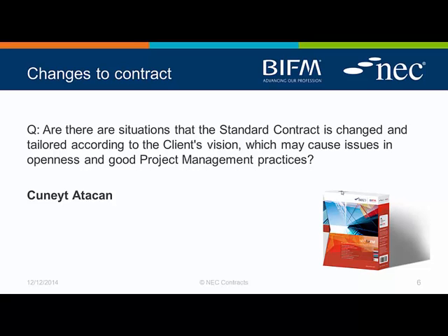My own personal view, when I'm trying to put a contract out and I'm under pressure from within the buying team, somebody saying, "Oh, I need this in the terms and conditions." In a lot of cases, they don't actually need to go in the terms and conditions. If it's around the client's vision, as the question puts it, you can quite often include that in the specification and say, this is why we try to do things.